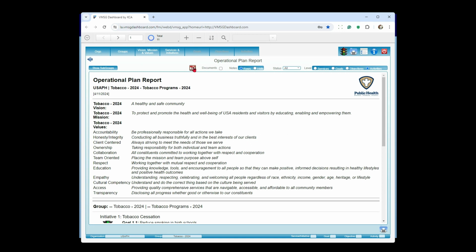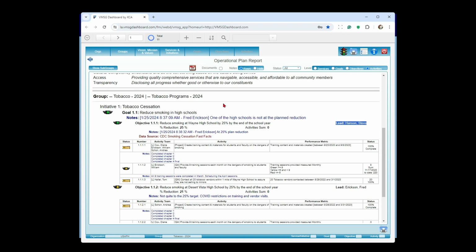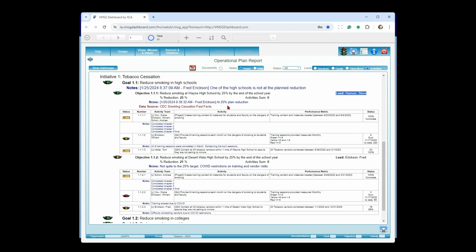The date field up here has a beginning and ending date. Now, every activity has a beginning and ending date, or at least an ending date. It has to have an ending date. And this is another kind of instant expert piece of information: if you don't have an ending date in an activity, it will not show up on a report. That's because it's always looking for a date range within the minimum and maximum dates, and a zero date is outside of that range. So if you're entering activities, always make sure you put in at least an ending date.